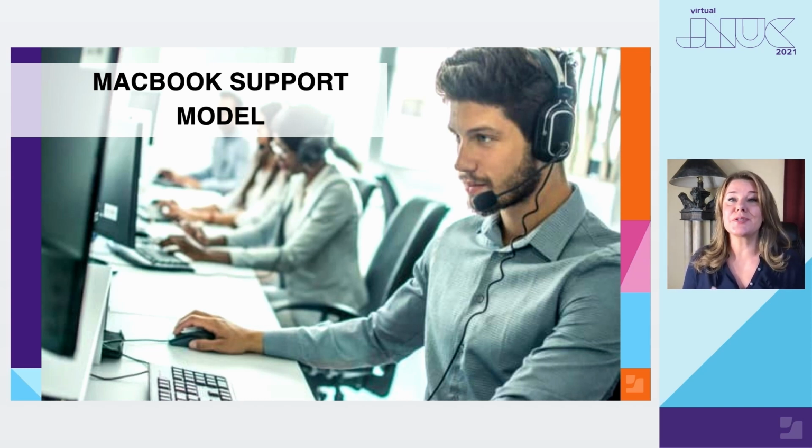But you also have to train your users to use the support system. In this scenario, when Chris and I were working with this user group, they were not used to reaching out to standard corporate processes. They didn't reach out to the desk. They kind of inter-supported each other. So when we were introducing this support model, we had to consider not just training the support staff, but also training our users how to use the support mechanism we were putting in place.